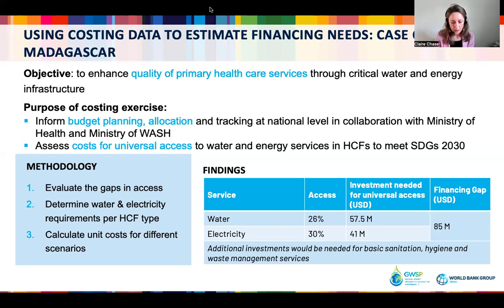And then for the unit costs, they used data from the project implementation. So projects that had been under implementation, they were able to collect the costs from those projects. They also looked at some donor-funded projects and the costs of those, and then used the Lancet figures to calibrate what they were finding from these other sources.